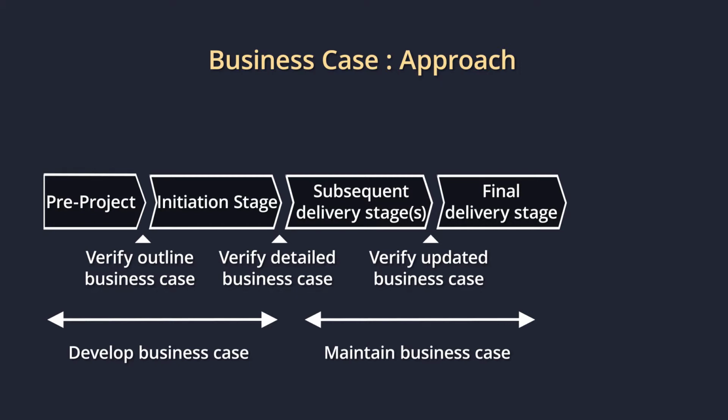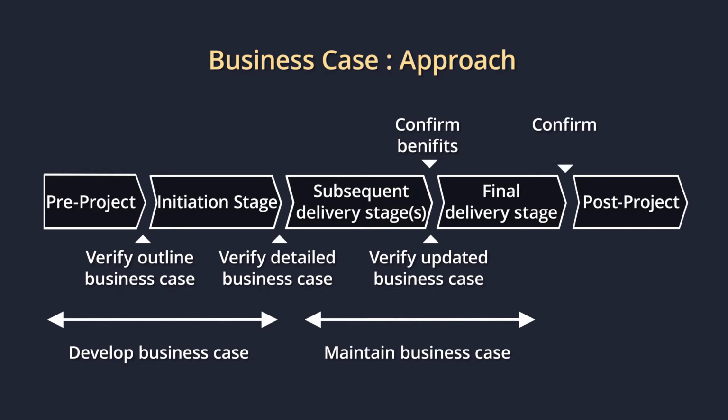At the end of each stage, as defined in the business case, the benefits are checked and confirmed before moving to the next stage. At the end of the project, all the benefits created during the project are consolidated and confirmed in comparison to what is actually defined as part of the business case, and checked in consolidation and confirmed before the completion of the project.